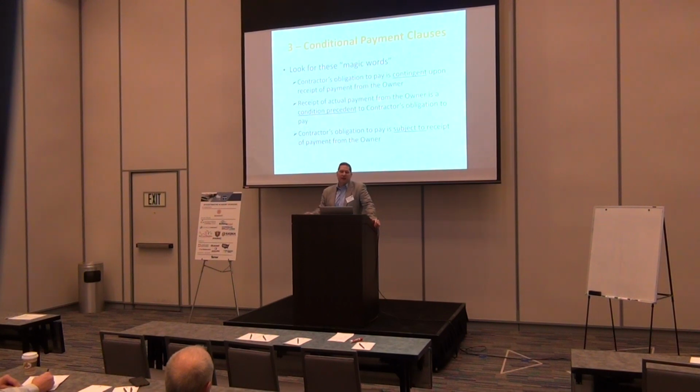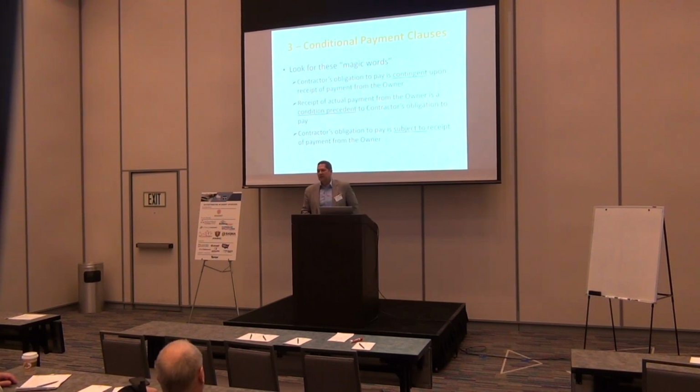So you need to know that up front, and either try to negotiate that out or know what you're getting into. That could be a reason why you want to understand what the owner's financial arrangements are to pay, whether there's a bond on the project. A bond can help you get paid. And then you also have mechanics lien rights on a private project. Those are things you would want to know and make sure that you protect your rights on.